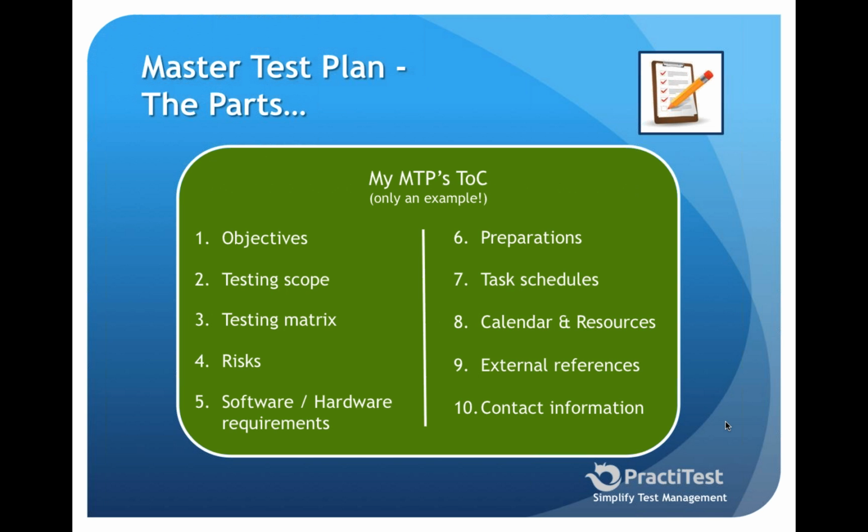Your MTP, your planning needs to be very flexible. And I think that those of you who are working Agile understand that this is the reason for Agile. Things change and you need to adapt. But those of us who not always work Agile, but work more on a waterfall level, tend to forget about it. So don't create your MTP and file it in your drawer. Review it every month, review it whenever you start a new phase to make sure that those assumptions and those plans still hold true, okay?